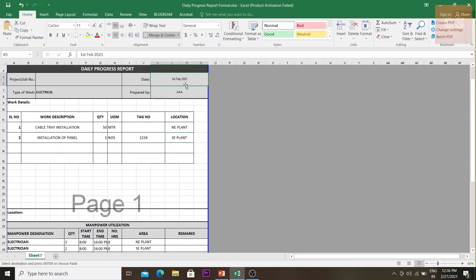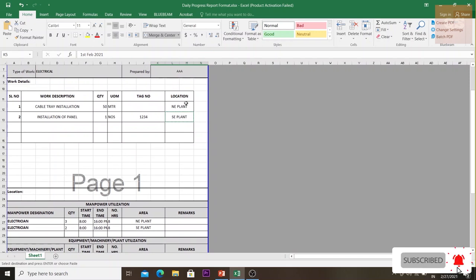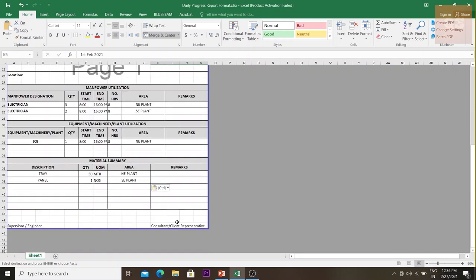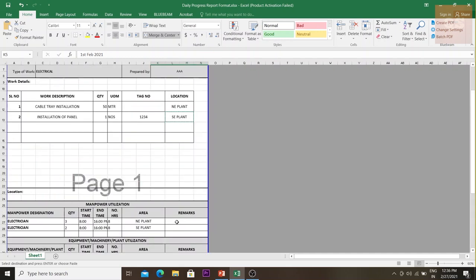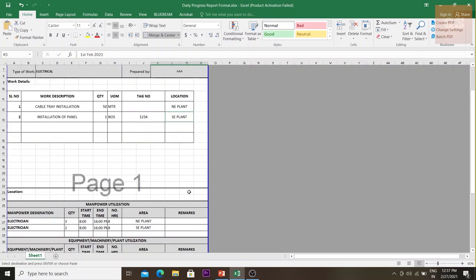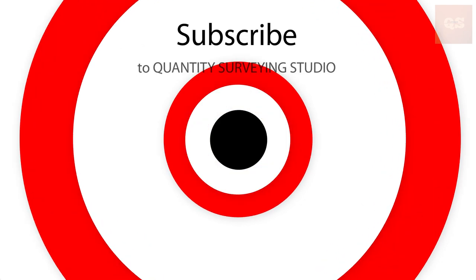You then make a cumulative sheet so you understand what all works have been carried out that month. All sheets will be officially signed off by the client, forming one document for your interim payment application. You will also highlight the relevant items in the drawings so the client or consultant can easily check, verify, and certify your bills. This was a very useful sheet overall.